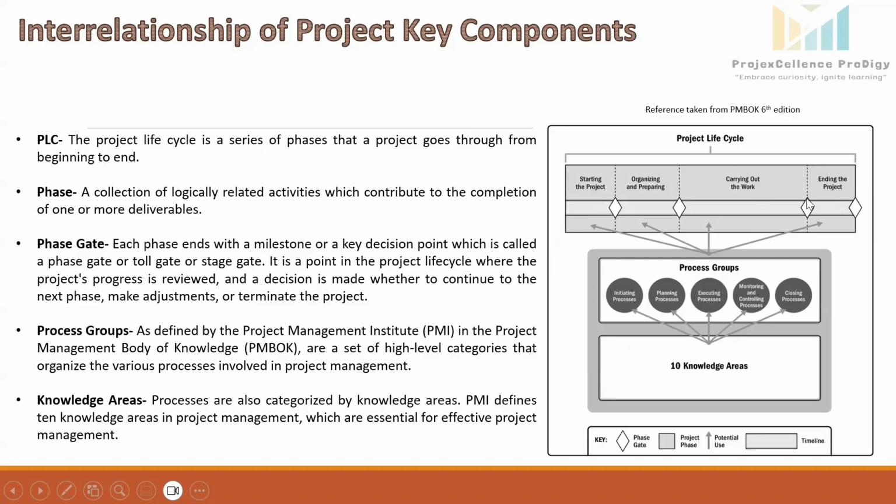Phase gate. In this figure, we can see the diamond shape symbols are showing the phase gate. This is a checkpoint at the end of each phase where the project's progress is reviewed. A decision is made to either move forward, make any change, or completely stop the project.